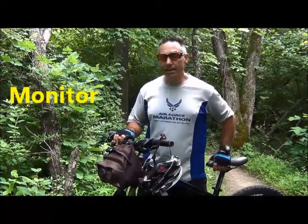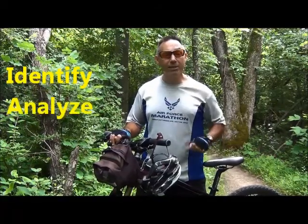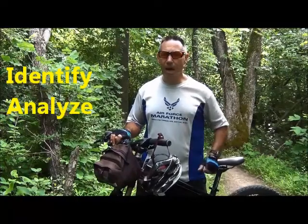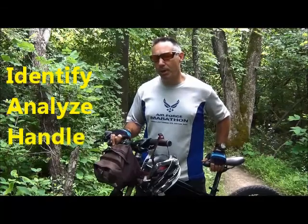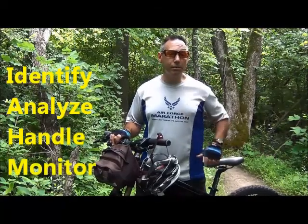I go off and I decide to go ride now in the Rocky Mountains. I might have a whole different group of risks involved. I'm going to continue to look at my risks. So look at those 5 steps. That's what I challenge you to do at your program. You have a good risk management plan. Have you identified the risks? Have you got the right people together to identify the risks? Have you analyzed those risks for the likelihood of them happening? What are the consequences if they do happen? And based on that, have you picked the appropriate handling strategy, and do you continue to monitor those risks?